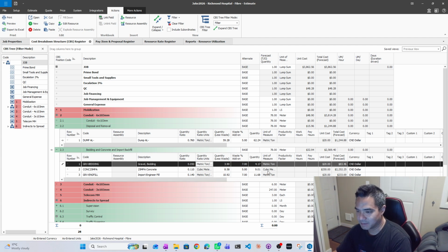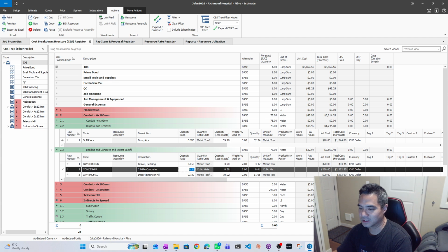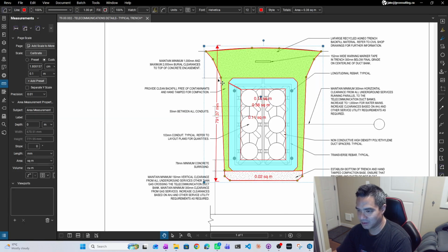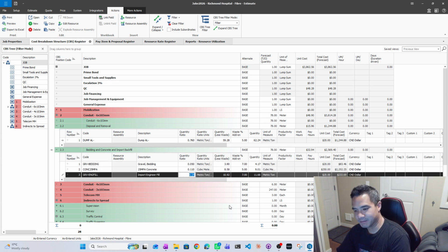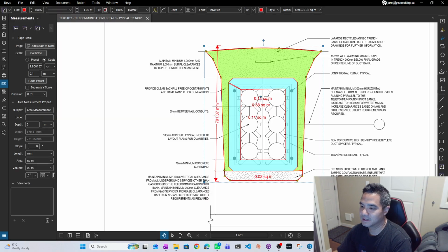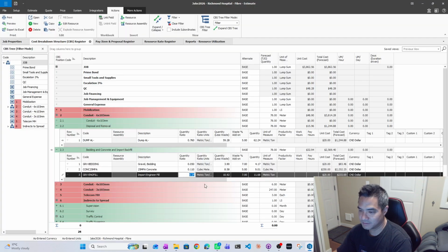Concrete, like I said before, it's already in cubic meters, so that ratio is perfect. So you're just using your square meter per meter ratio to calculate this. And your import fill, same thing. I typically use around 2.5. So this being 0.14 times 2.5 is 0.35.